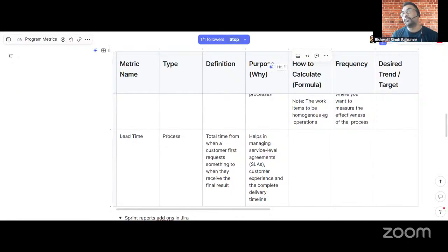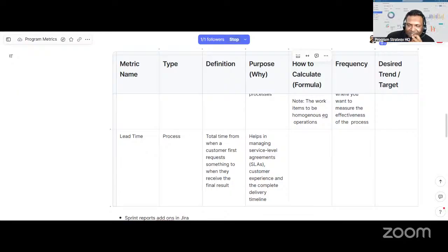So the challenge we have seen is that people tend to miss sprint deliverables because the trainings are piled up. We are expecting that in the fourth quarter, year end, trainings will be pushed again, at least for us that is a process. So we have to be ready and keep a buffer for those trainings also. That actually impacts the lead time.